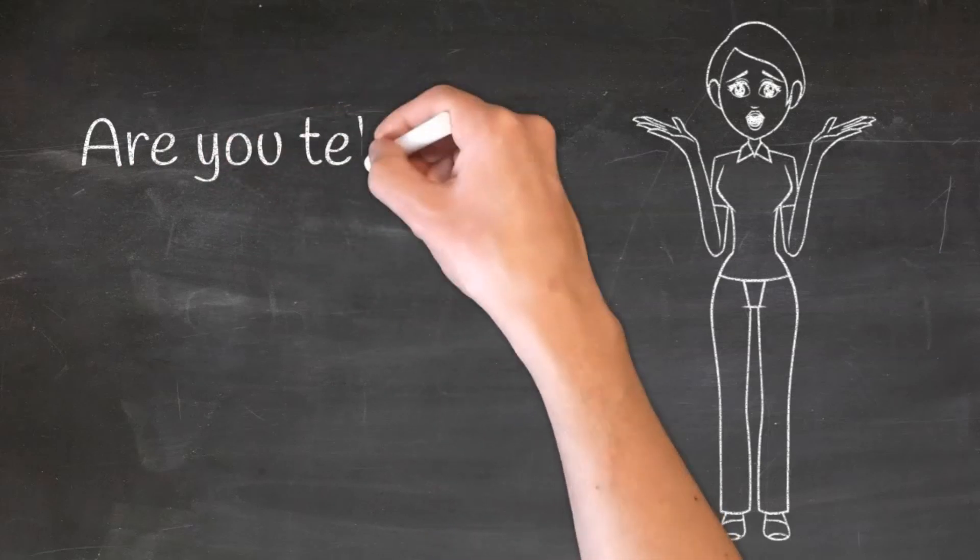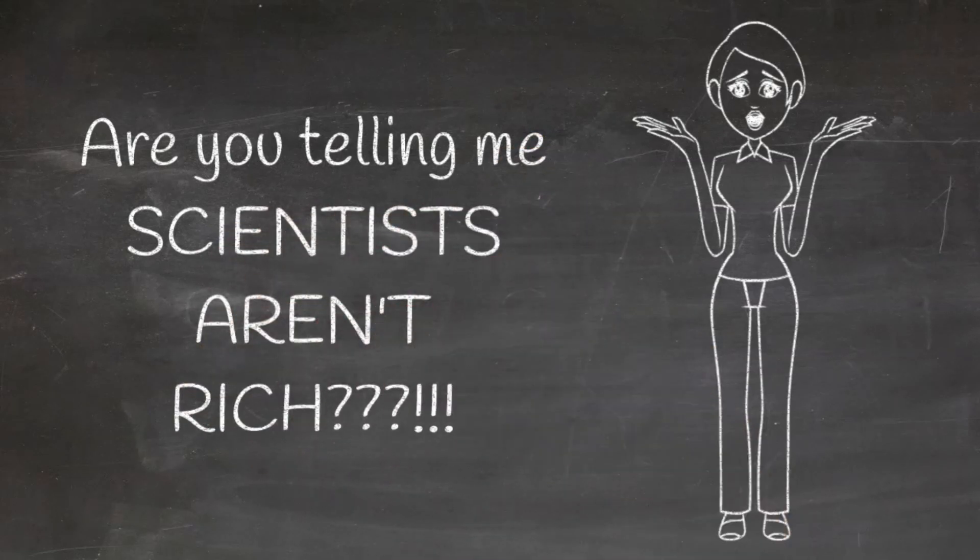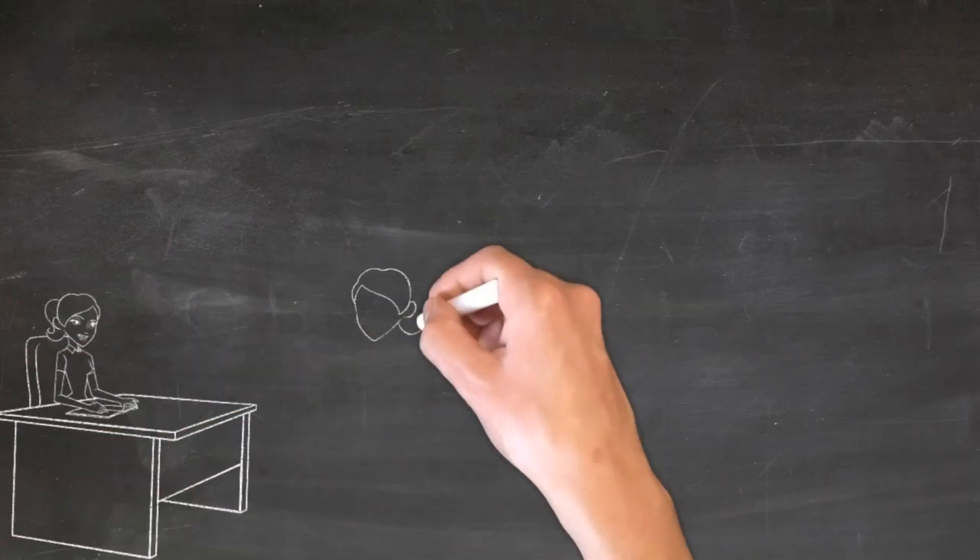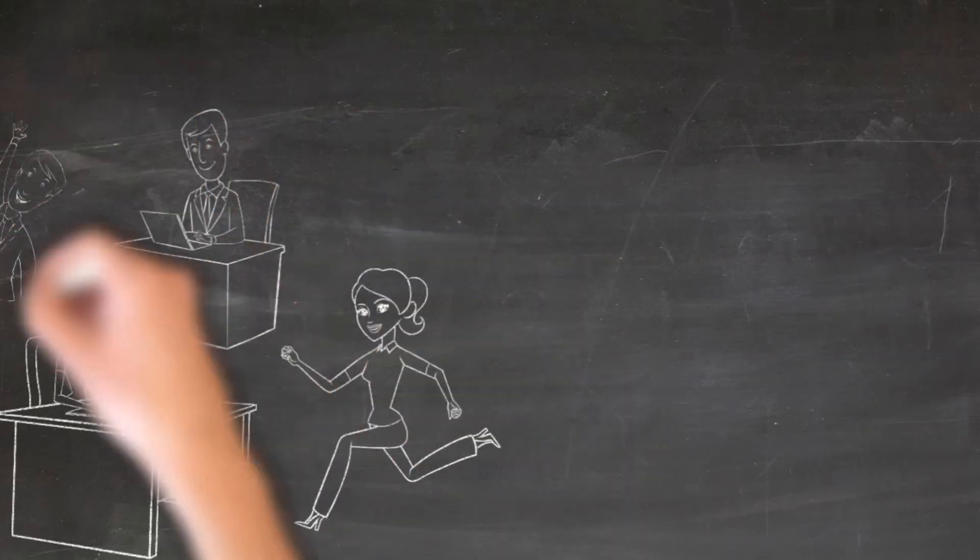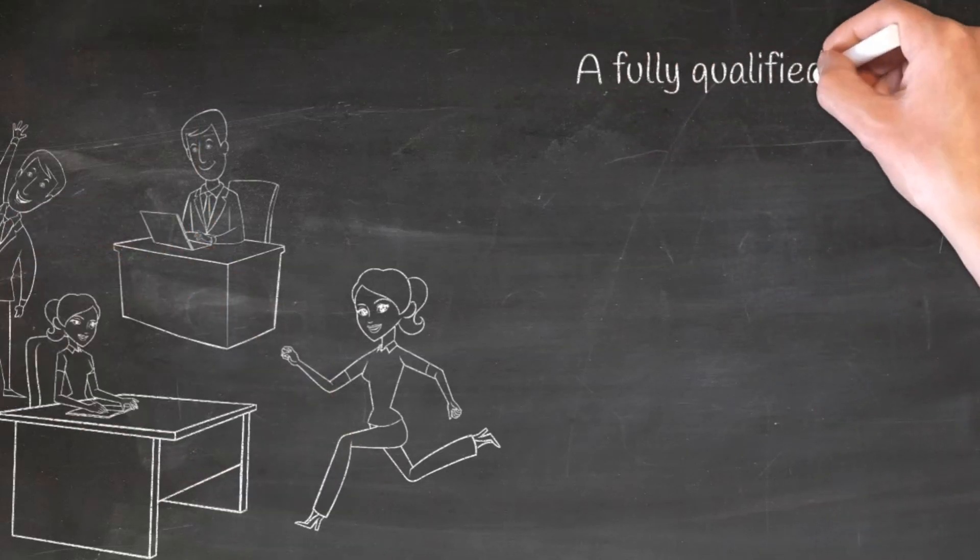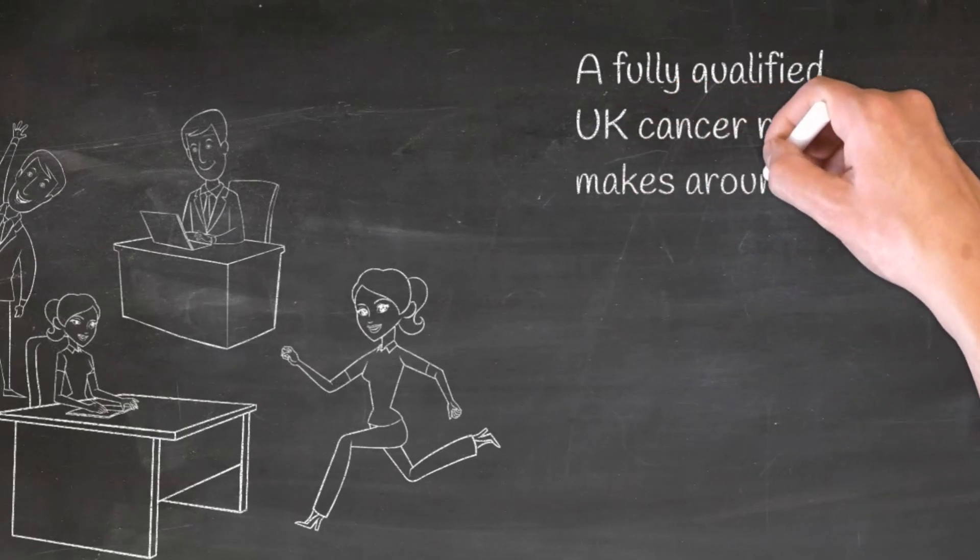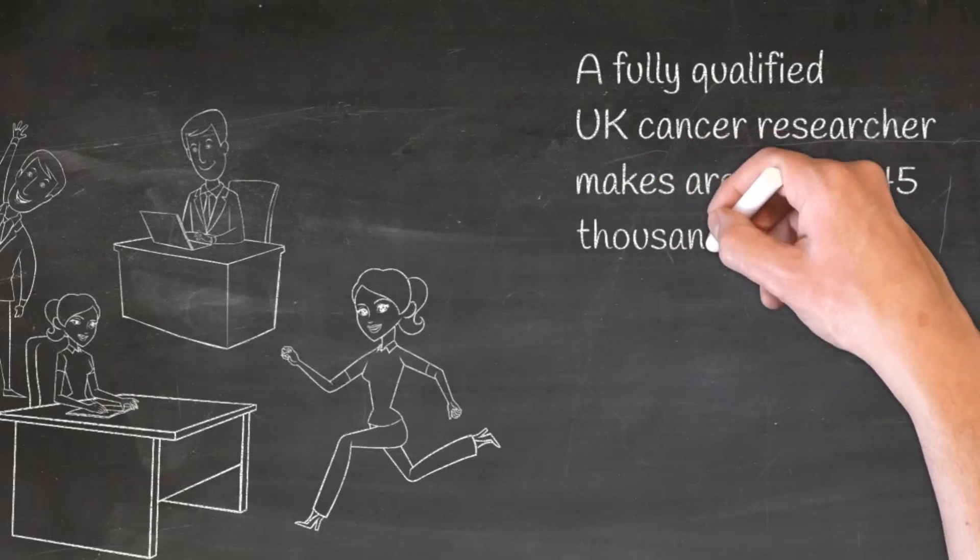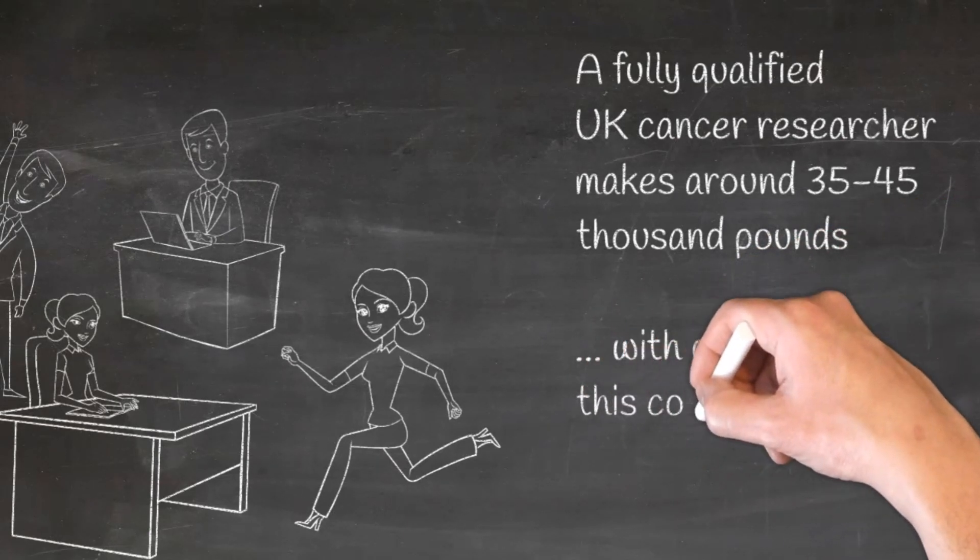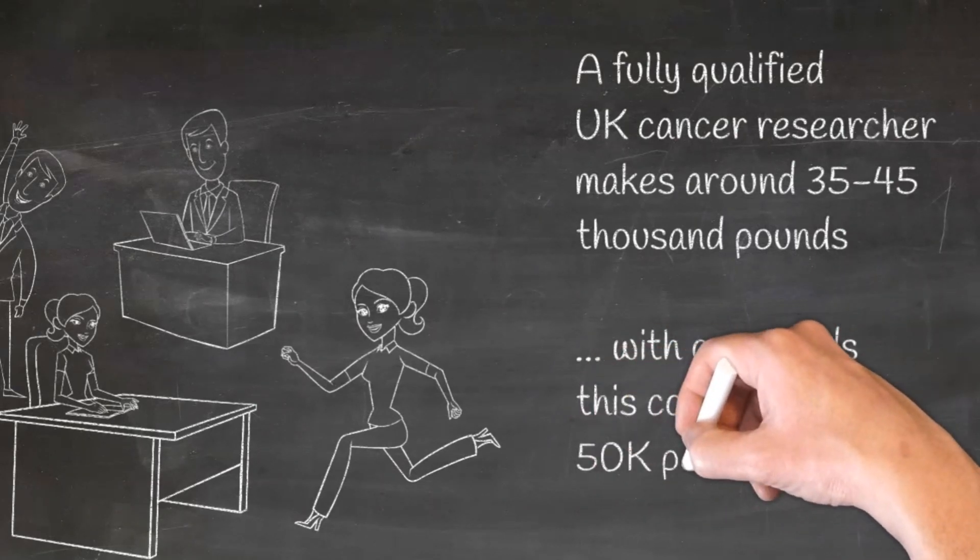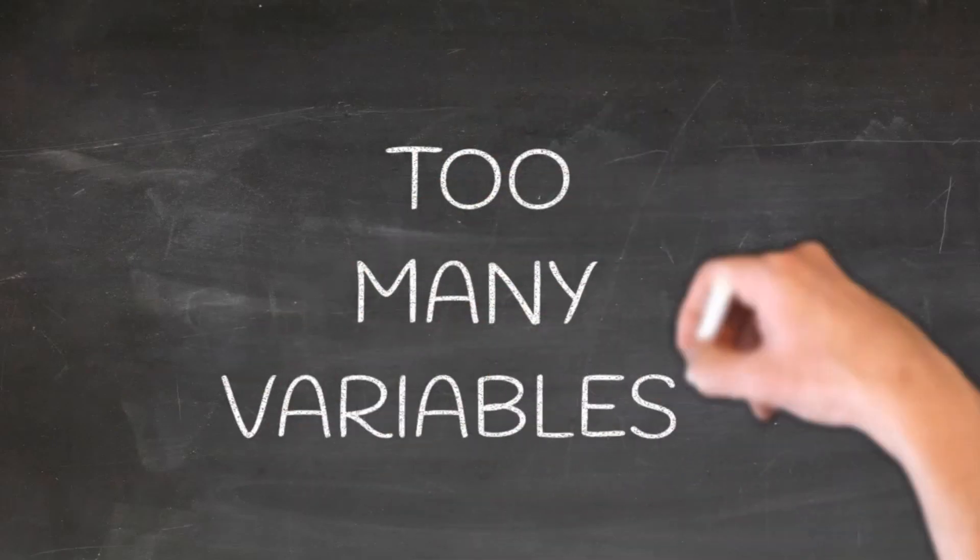So now that we've got all our equipment and chemicals covered, it's time for salaries. And it probably won't surprise you to know that scientists don't get particularly high salaries. We're not generally getting six-figure salaries if we're working on cancer research in a university. But we do, of course, have to pay salaries for our scientists. We are not volunteers. These are highly qualified individuals who have PhDs, several degrees, awards, that kind of thing. The salary for a cancer researcher varies a lot across the world, but an example would be from the UK. If you've already got your PhD, then you'll be working in a role called a postdoc position. And the gross salary for that would usually be about £35,000 to £45,000 a year. Now, if you're planning a project where you hire one of these postdocs, you're actually going to have to pay overhead on top of that to the university so that they can keep the heating and lights on and support staff. That brings it up to about £50,000.